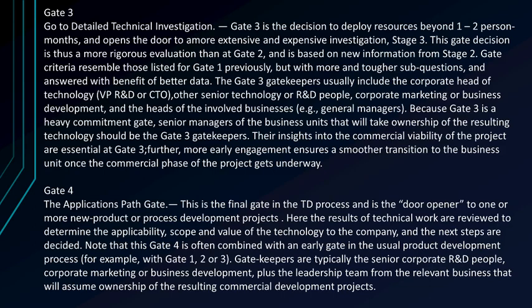Stage 3. Detailed investigation. The purpose of Stage 3 is to implement the full experimental plan, to prove technological feasibility, and to define the scope of the technology and its value to the company. This stage could entail significant expenditures, potentially person-years of work. Besides extensive technical work, other activities focus on defining commercial product or process possibilities, undertaking market, manufacturing and impact assessments on these possibilities, and preparing an implementation business case.